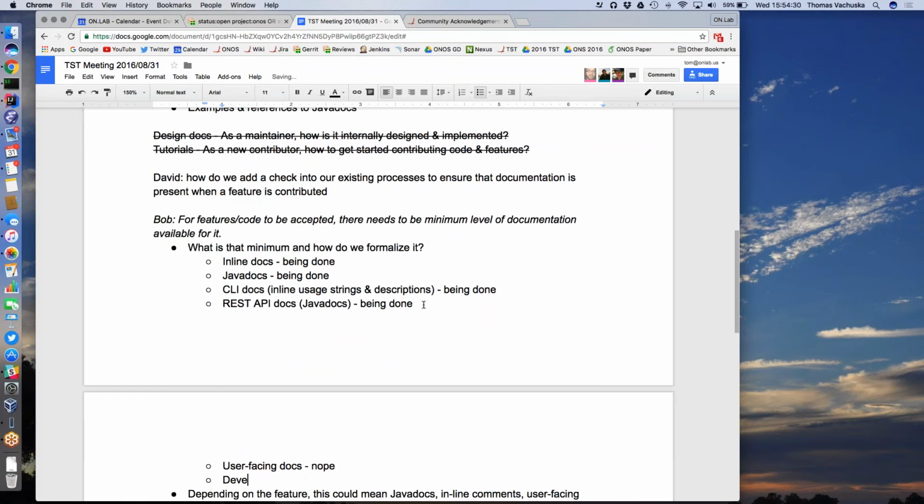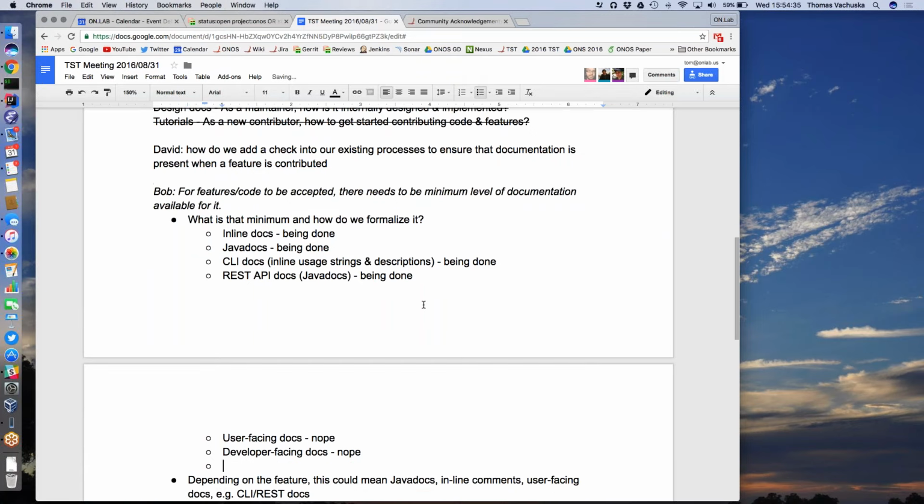And then the third thing, well, actually, I guess there are four things. The fourth is that we think documentation tasks should be part of sprints. There should be a documentation section in each iteration where we say, what are we going to do on the documentation for this iteration? And we accept documentation just like everything else. So the documentation backlog feeds into the documentation section of work in iterations, if we can. It may not always fit well, because some long-form stuff takes a long time to write, but it'll still be in the backlog.